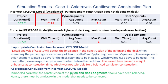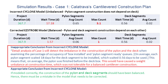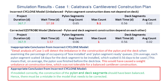This excessive waiting time of 17 days in the incorrect Cyclone model did not go unnoticed by its developer. Unfortunately, it led to the wrong conclusion that Calatrava's plan should be abandoned because it would cause an unavoidable weight imbalance during construction. Clearly, the correct conclusion upon noticing the excessive 17-day waiting time is that there must be a mistake in the simulation model — specifically, the absence of the necessary red feedback loop shown earlier.